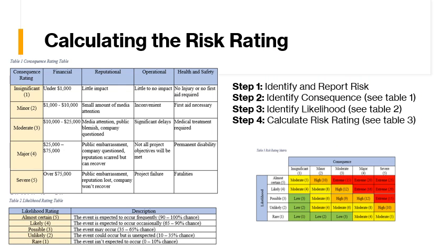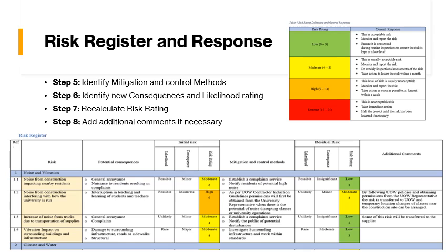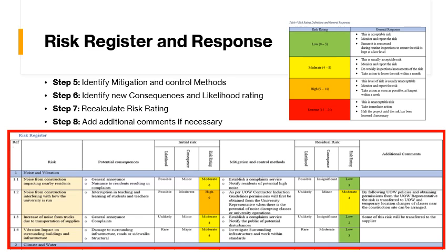The risk management plan is site-specific and addresses responsibilities for risks and emergency procedures. The risk rating is calculated by multiplying the identified consequence rating with the likelihood rating. The higher the score, the more urgent the risk is. This table shows the general response to different levels of risk. The risk register demonstrates risk ratings for identified risks before and after mitigation actions. The risk management framework is designed to be easy to follow and add new risks to if they arise.